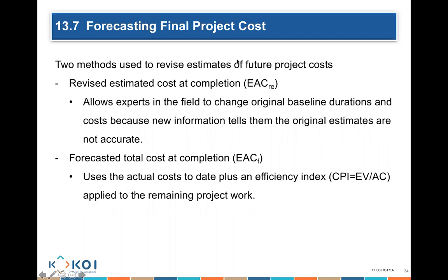So the revised estimate is like how we had budgeted at completion before. It's like a new budget at completion. Something has changed in my project and I'm trying to create a new baseline. And that's what we call estimated at completion.